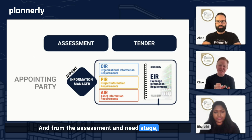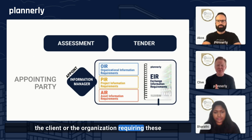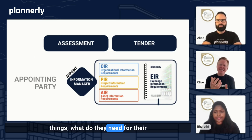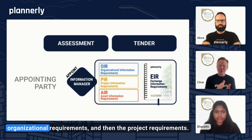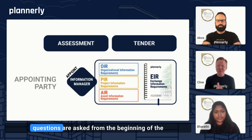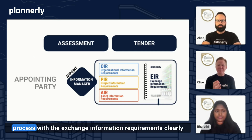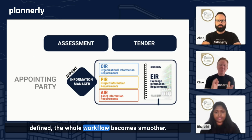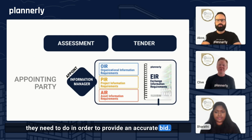The standard provides a structured framework to ensure that you gather the right information from the start. From the assessment and need stage, it helps us define what information the client or organization needs for their decision making, establishing the OIR — the organizational requirements — and then the project requirements, making sure the right questions are asked from the beginning. And going through the invitation to tender process with the exchange information requirements clearly defined, teams know exactly what is in scope and what they need to do to provide an accurate bid.